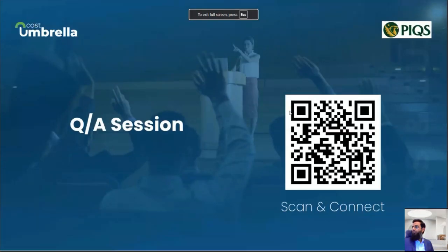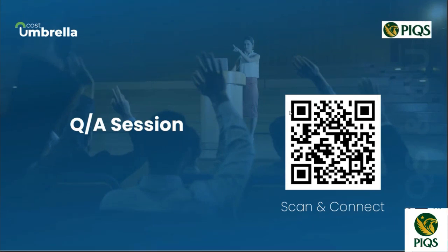So if we align it with the RIBA project delivery plan, the pre-concept design is developed during RIBA stage 0, which is strategic definition. And the master plan is developed during stage 1, which is preparation and brief. So answering the question of Mr. Sikesh, the pre-concept design is developed during RIBA stage 0.